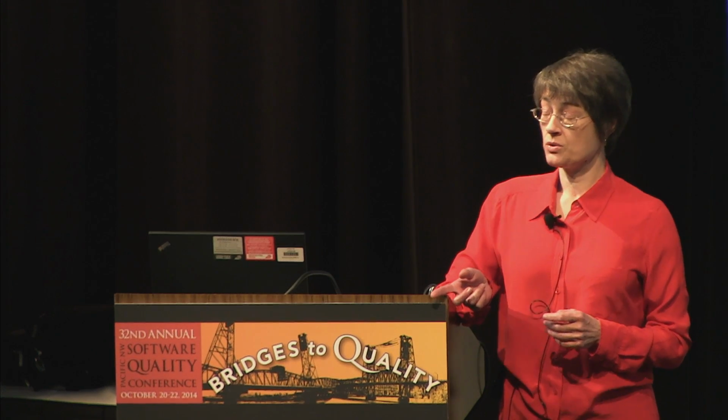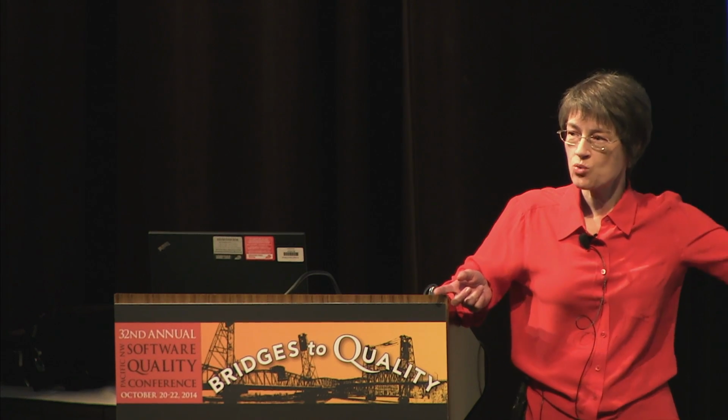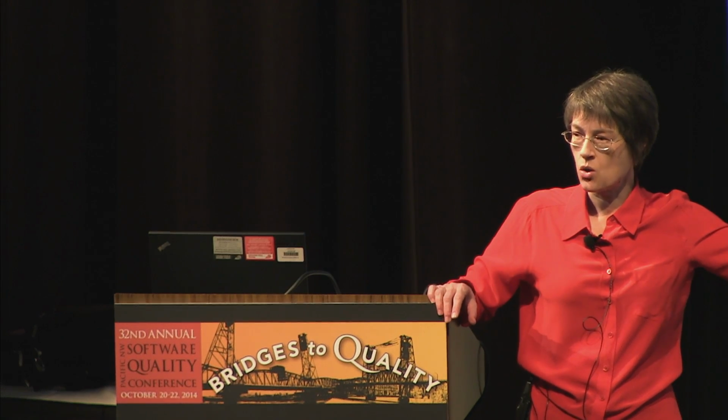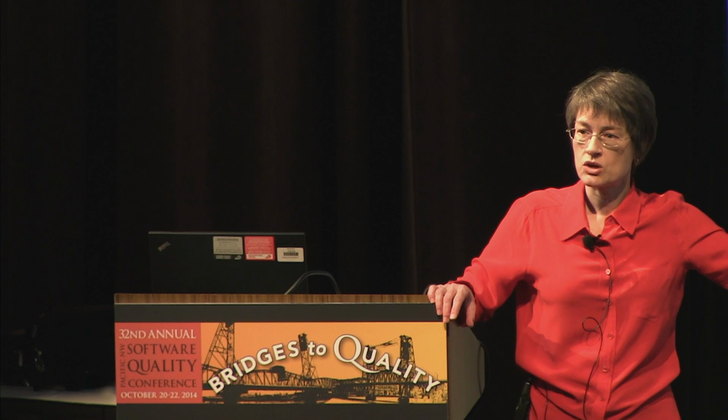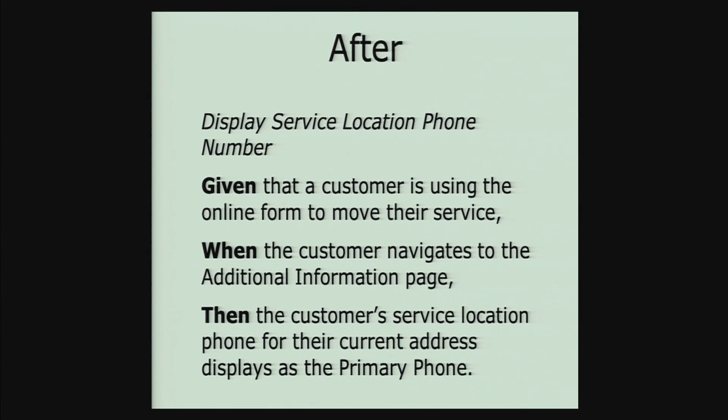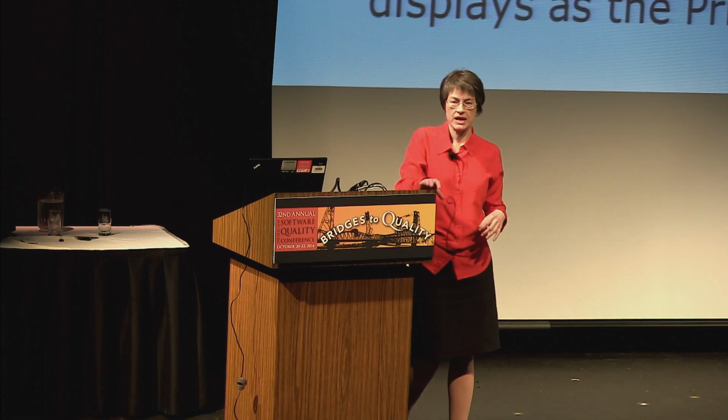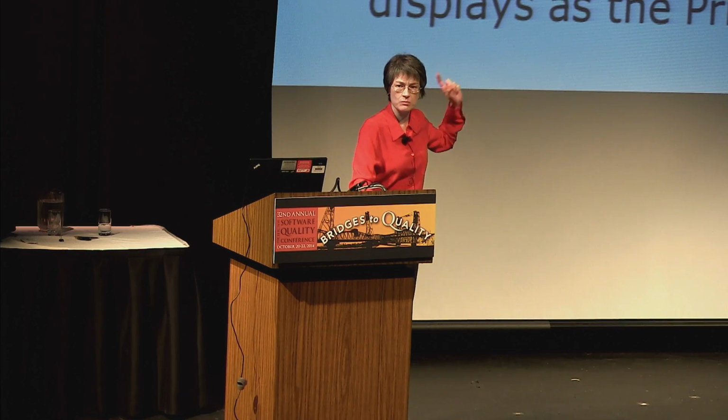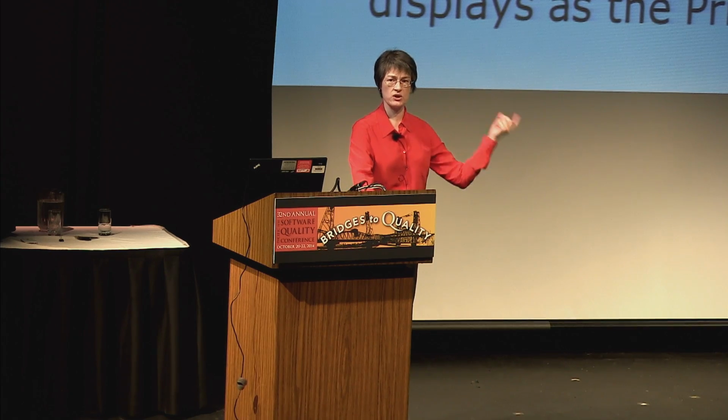Well, that's actually a really good question, because just writing the acceptance criteria this way wasn't the whole story. What we did as a group is that we would sit down. That team had like three story times every sprint. We had three-week sprints, and we would meet for story time three times during that period. And so we would have reviewed these more than once. And so usually it was very iterative.